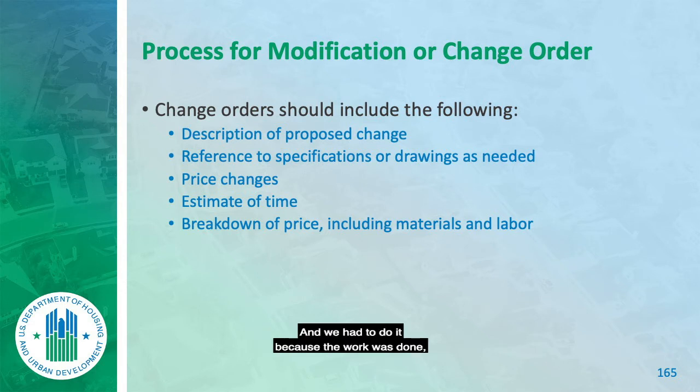And we had to pay it because the work was done. It was all there. Work was done. We reprimanded the folks, warned them, gave them written warnings. But I had to pay $18,000. However, the other $15,000 I could not find or justify. He says, I want that money. I said it was part of the work or something like that. And he says, no, I want that money. And I'm not going to accept $18,000. Well, we have to conclude this in 60 days. And he did not accept it.